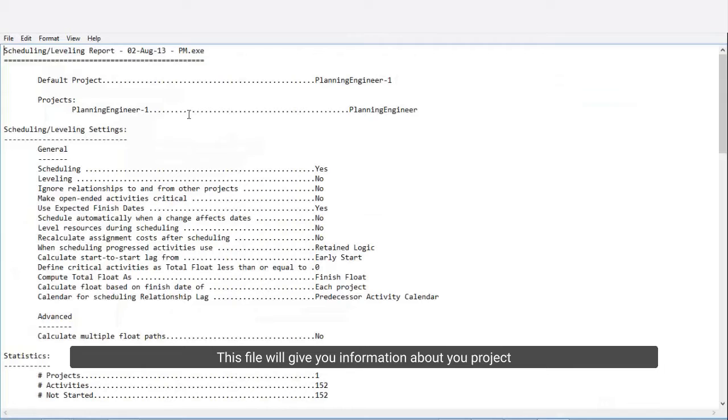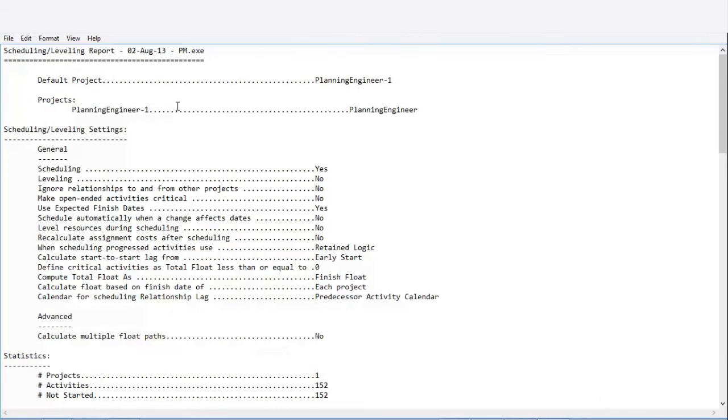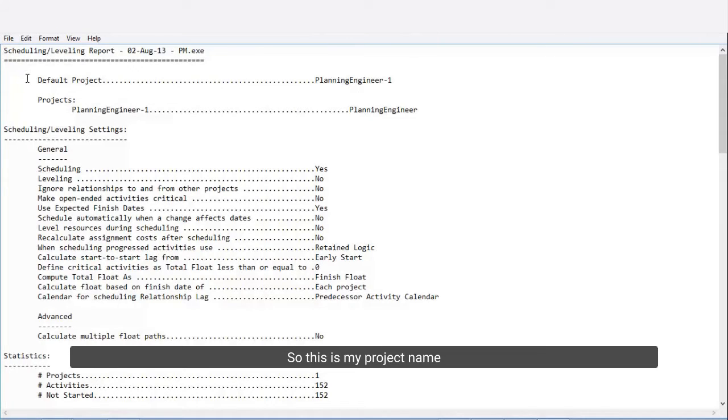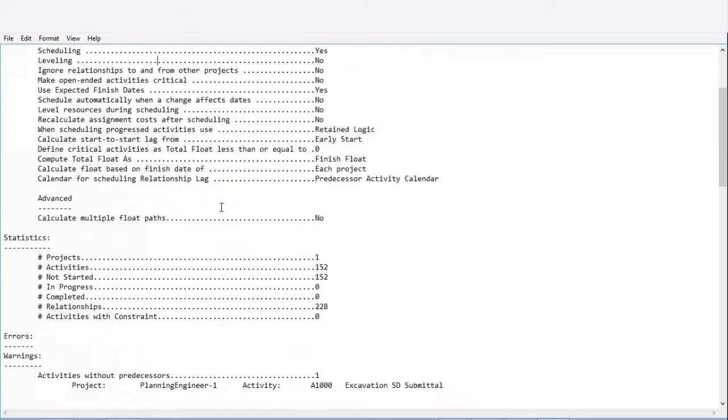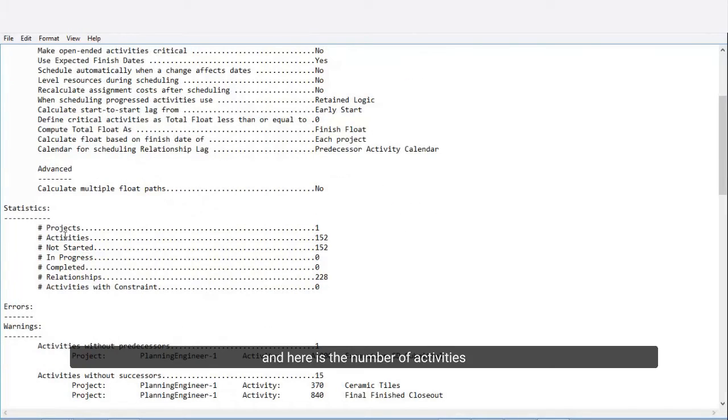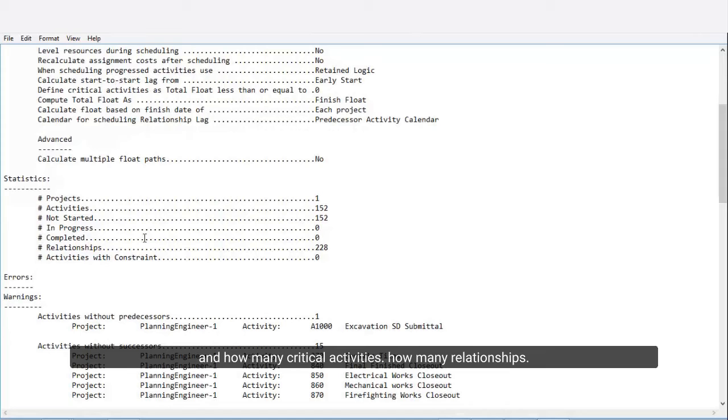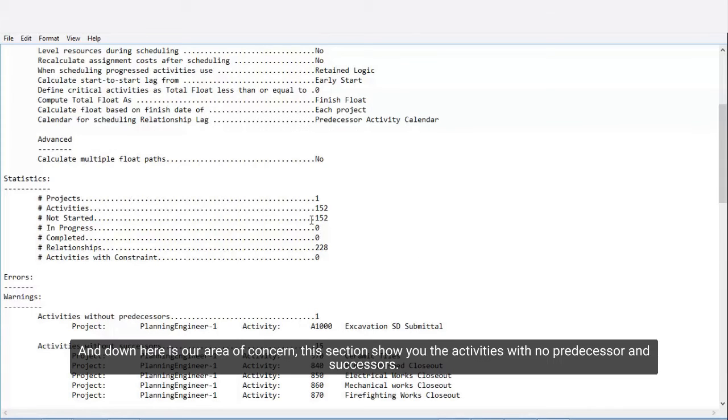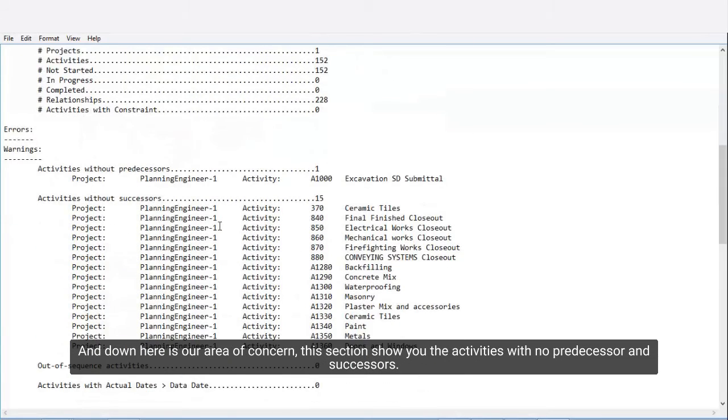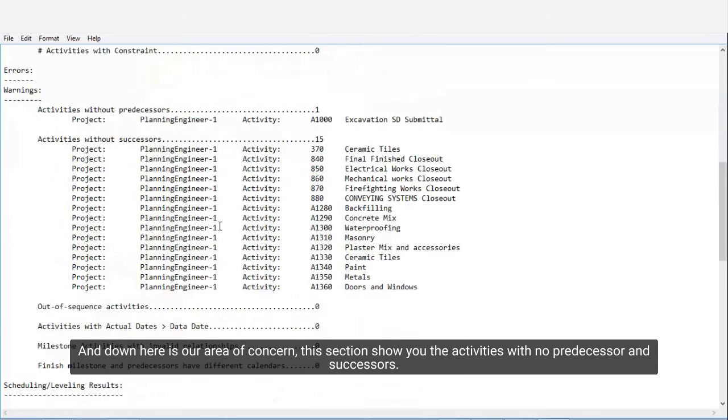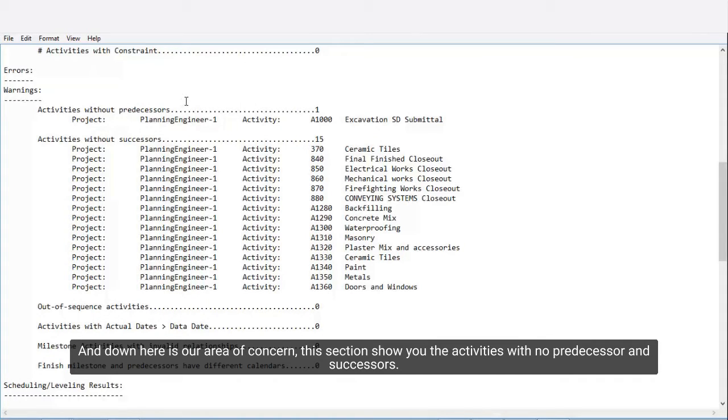This file will give you information about your project. This is my project name, and here is the number of activities, how many critical activities, how many relationships. Down here is our area of concern. This section shows you the activities with no predecessors and successors.